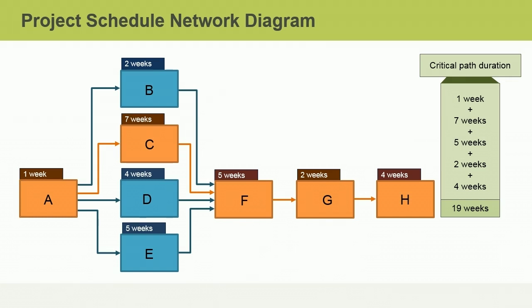In our help desk project, we have determined that activities B, C, D, and E are not dependent on one another and can be performed simultaneously, which creates efficiency. We have also determined that we can quote 19 weeks as the overall duration of our project.